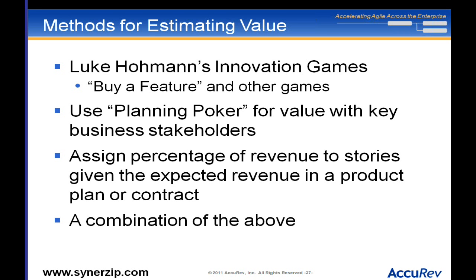That approach gives you relative value, and having relative value is much better than not being able to distinguish between two things. Use planning poker if you're not familiar with it — that's something agile teams often use to estimate cost, but it can also be used by business stakeholders to estimate value. One person may say, 'That's three points of value,' another might say one, and now you have a discussion: 'Why three?' 'Well, I was just talking to these customers and the competition is coming out with this.'